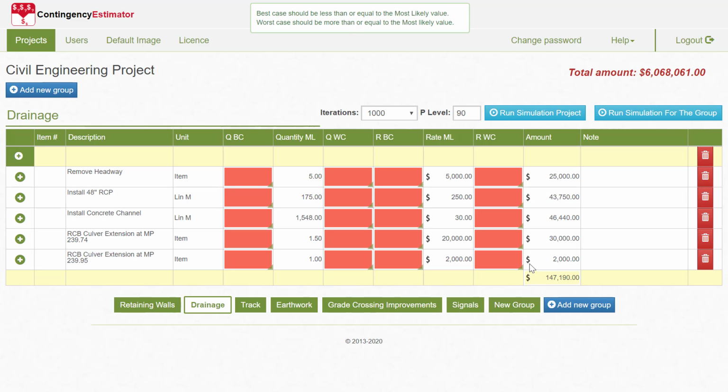One of the biggest benefits of going through this process is for the team to inquire as to where did the numbers come from, what's the background, and to explore whether anything's missing. Many times the estimator doesn't have sufficient information to pick up all the data, and that discussion is key. Often the project manager will be well aware of changes which are very recent and others would not be aware of them. So that discussion is really key.